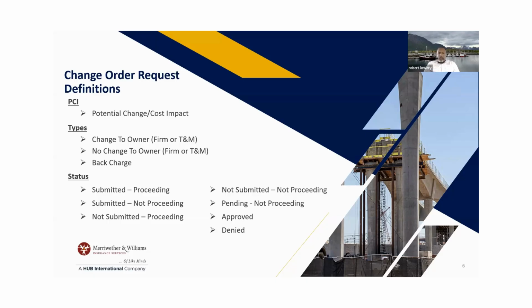And as you're getting close to that number, say $4,000, okay, so when you get close to that and you still haven't finished, you say, hey, you know what? I'm about 80% finished and we're at $3,500. Then you can go back and do another T&M to add on so they know that the work isn't being done. So T&M can be a good thing, but it's management of that takes a little extra.